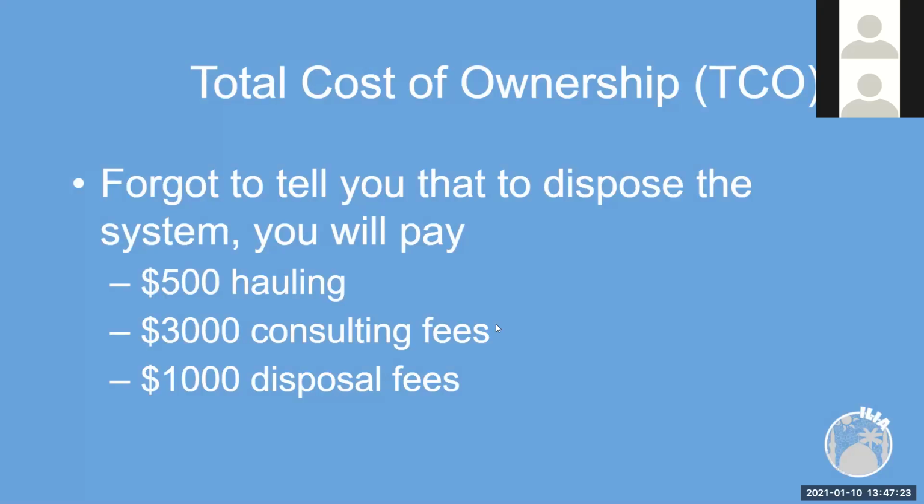So we call this total cost of ownership. The nice thing about it, it tells you the total cost of your project over a period of time. Usually for most projects, we use 3 years. It includes the time where the project is not yet live, it's still in development, plus whatever period of time after that where it's operating up to 3 years.